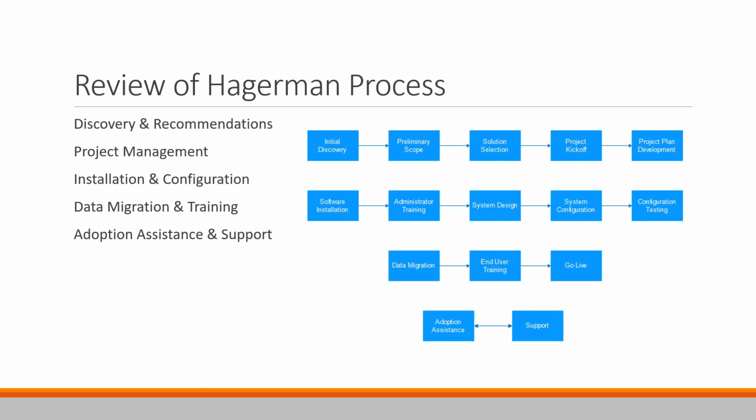So we normally in our proposals, it depends, we're changing our proposal process up a little bit. I know for every proposal that I generate, I do my best to capture what training is going to be required, who the intended attendee should be, what courseware should be recommended. The scheduling typically takes place during a project kickoff, because it needs to be flexible regarding how long it takes to get the server software installed, etc.